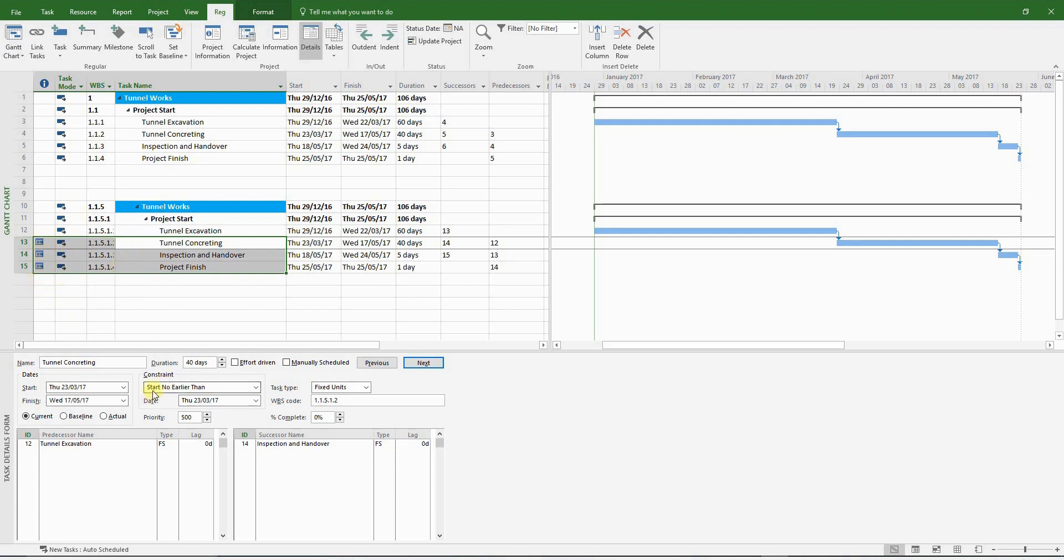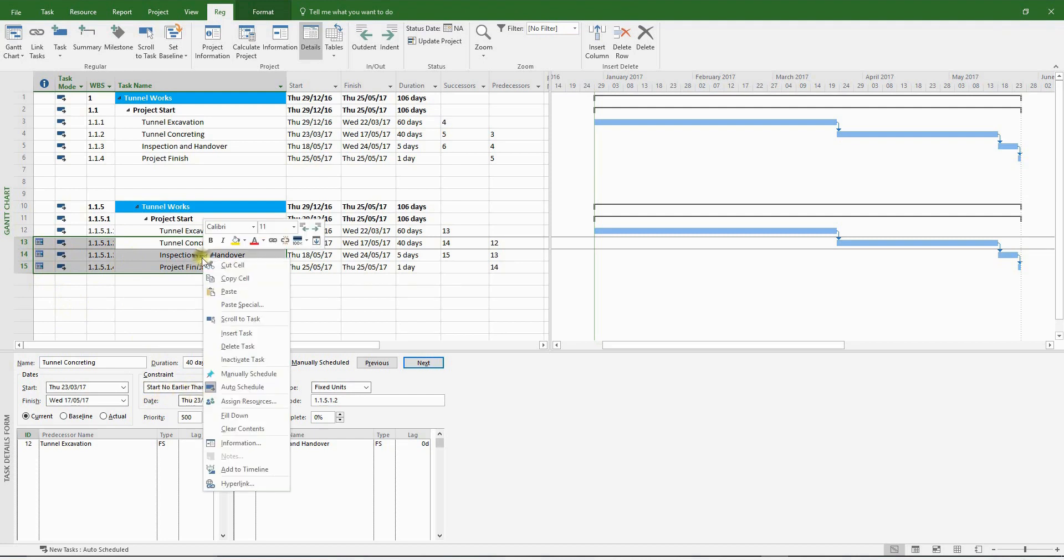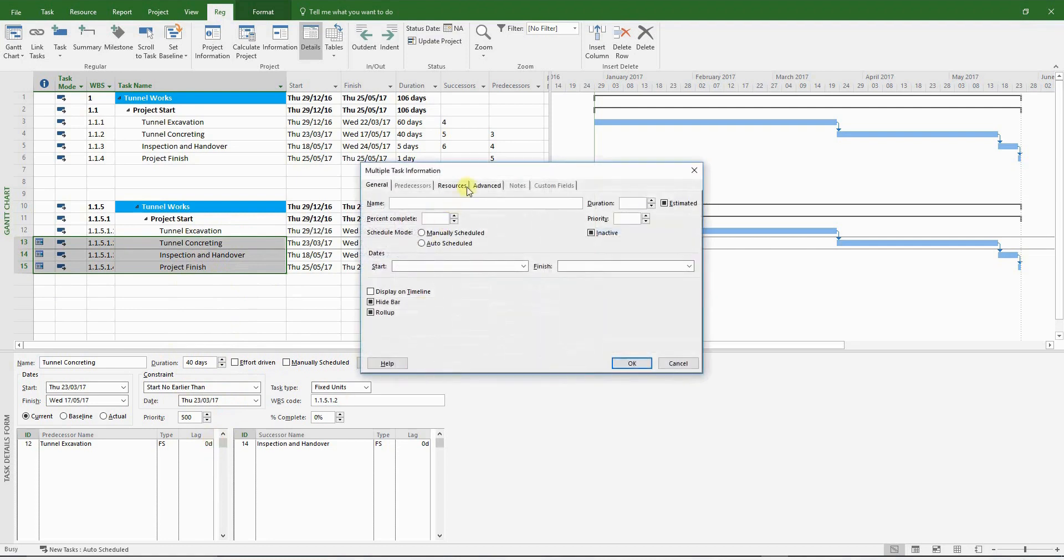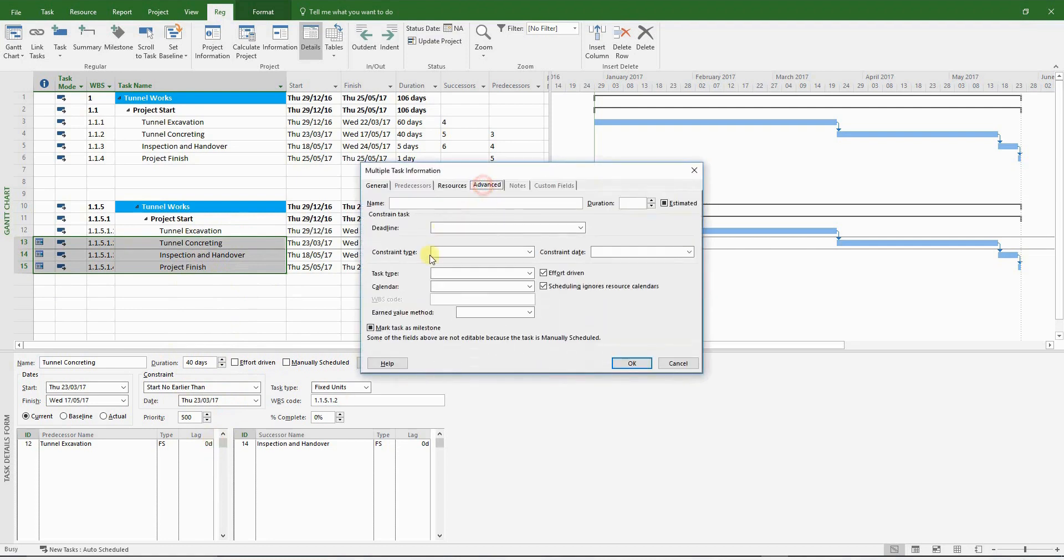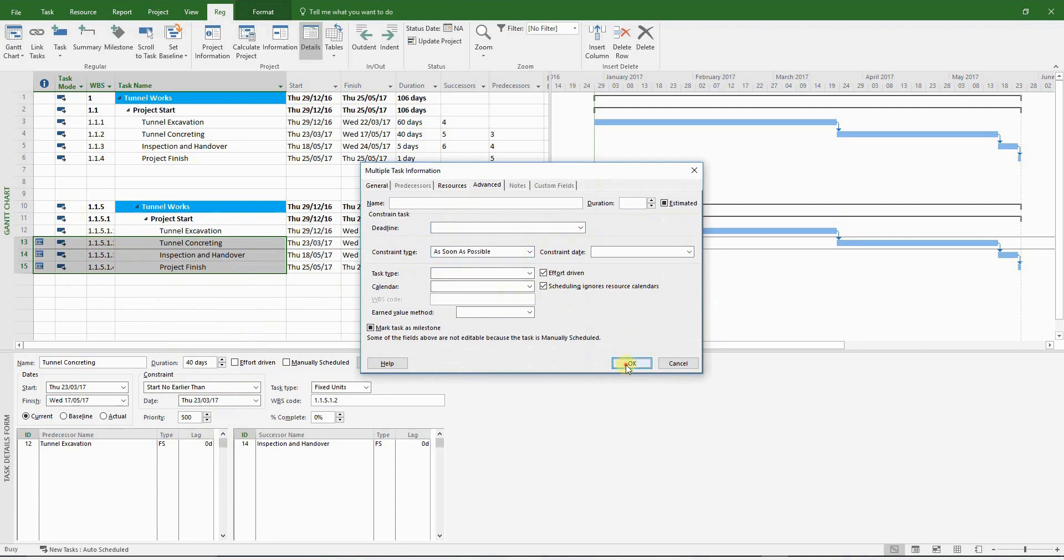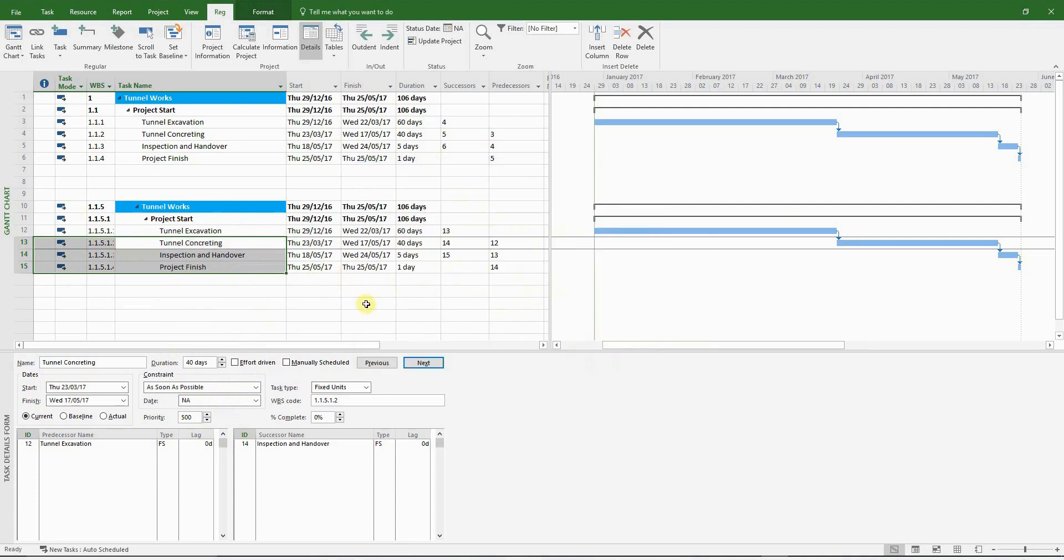You can check it from the details pane or right-click, information, advanced, and it will be in the constraints panel. You can't see it now because more than one activity is selected. Let's change that to as soon as possible, which is the default option. And there you go. So that's how you create this particular construction program.